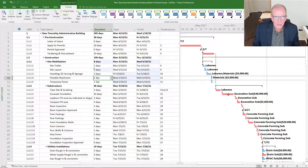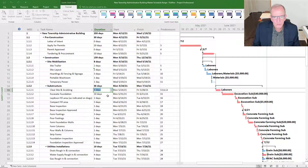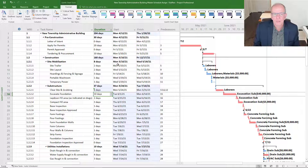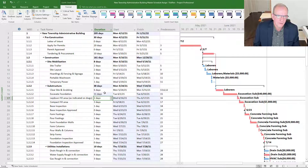If you're not sure how to show that in Microsoft Project, you go under Format > Critical Task — that turns it on and off so you can see the actual critical path, which is the longest path through the project. Any activity I add time to on the critical path is going to change my finish date — it's going to add an extra day to my project. So if I'm originally developing this plan and I allocate extra time to various activities, it's going to make my project take longer, but I might be thinking I've given myself a buffer.